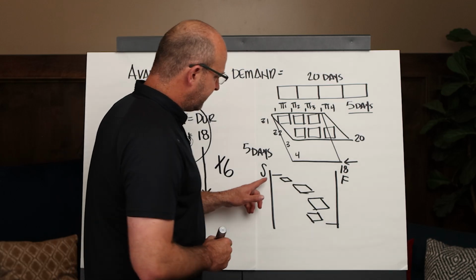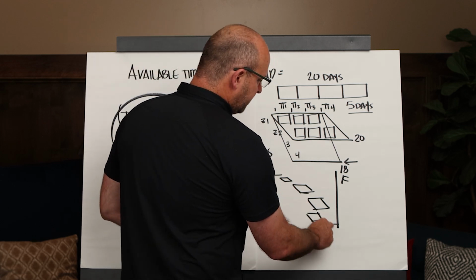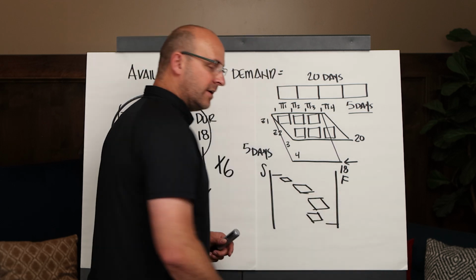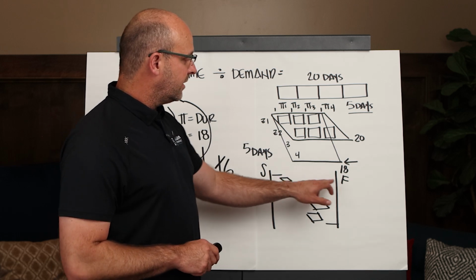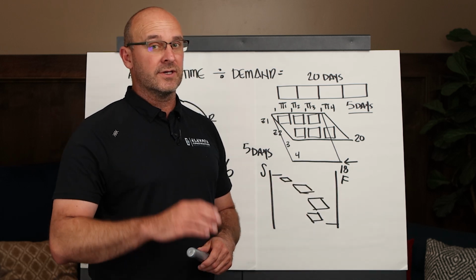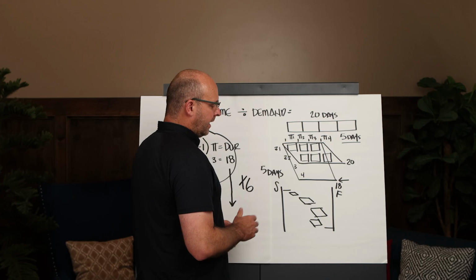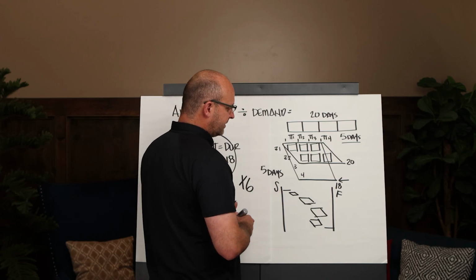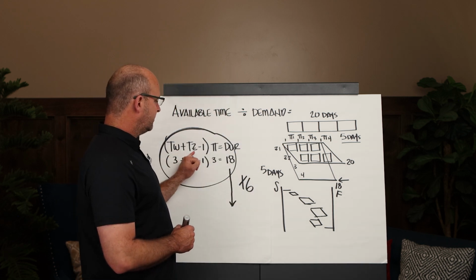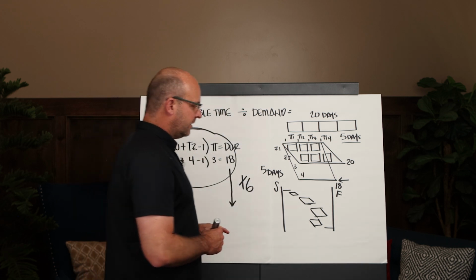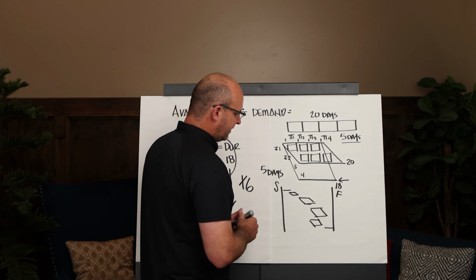And if you say, hey, this is my start, and then you make a plan and schedule and say, this is our finish, that's fine. Or if you have a client that says, I need you to start and finish here for this construction project, that's fine as well. Because when you figure out how long each phase is going to take, all you need to know again are the takt wagons, takt zones, and the takt time, and then you can start to experiment with each of the phases. So let me give you an example.